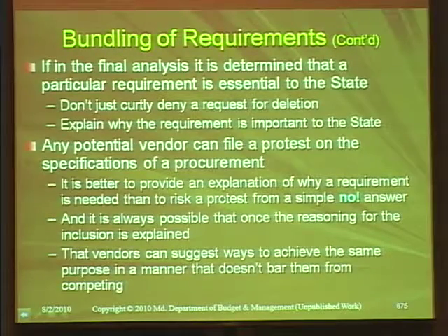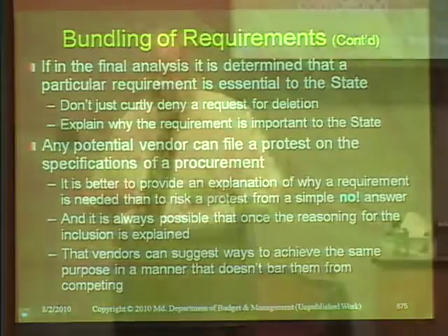Any potential vendor can file a protest on the specifications of a procurement. It is better to provide an explanation of why a requirement is needed than to risk a protest from a simple no answer. And it's always possible that once the reasoning for the inclusion is explained, that vendor can suggest ways to achieve the same purpose in a manner that doesn't bar them from competing. And that's why it is good to communicate with your vendors.